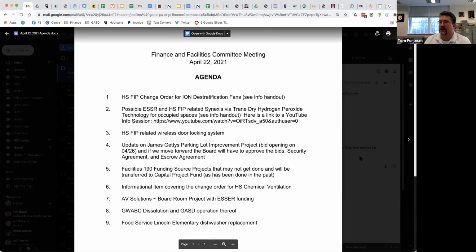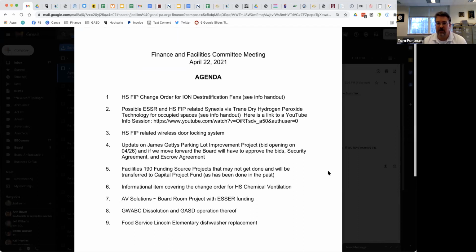Okay, the next item is in the buildings and grounds budget, there's something called the 190 projects. Those are projects that are usually less than $10,000 that we do. Sometimes we can't get them all done in a year, and then we come to the board towards the end of the year and say, we still want to do these projects, but we're going to ask to move them over into capital project fund so that we don't lose the money, because once the general fund closes out the fiscal year, you can't use that money anymore.